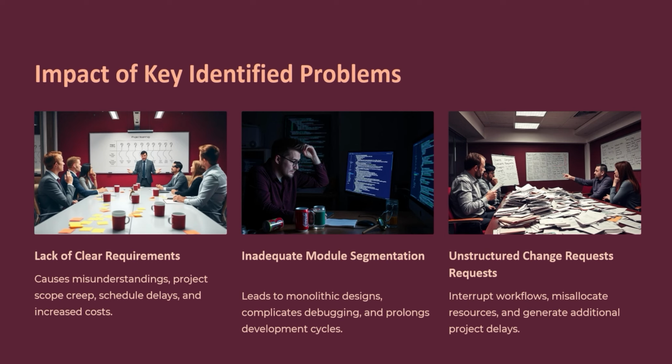From our research, we identified seven main issues, but only three were validated as major after interviews and analysis. So the first one was unclear project requirements. Clients often give vague inputs at the beginning, causing confusion later on. And then the second was poor module division. Projects were not divided into proper modules, making coordination harder. The third one was frequent changes from clients. There was no structured way to handle client changes mid-project, leading to inefficiencies.